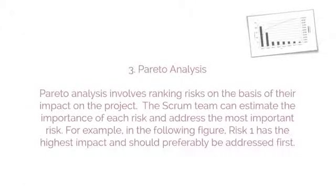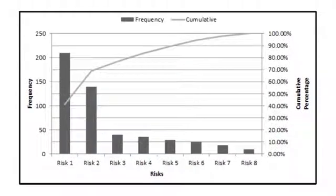Pareto analysis involves ranking risks on the basis of their impact on the project. The Scrum team can estimate the importance of each risk and address the most important risk first. For example, in the following figure, risk one has the highest impact and should preferably be addressed first.